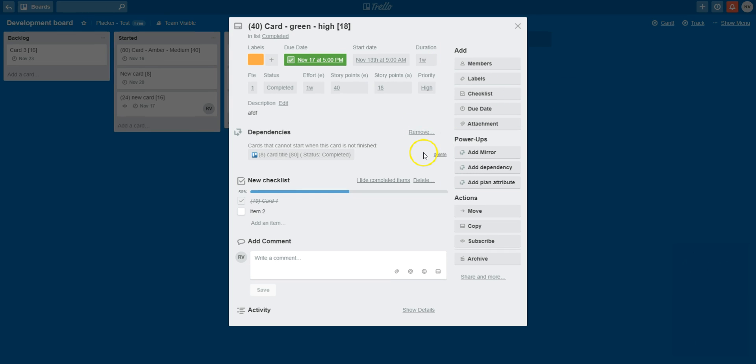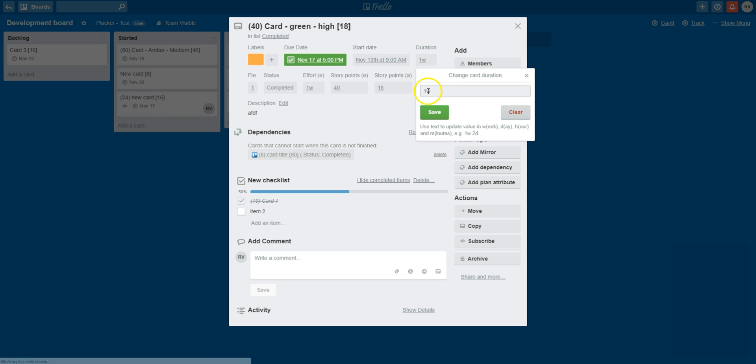You can update plan attributes by clicking on them. For example, by changing the duration from one week to two. You will notice that if I do that, the end date will also be moved by a week.